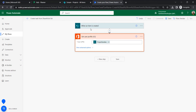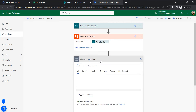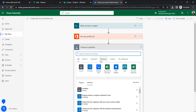For the principal name I'm going to provide the Project Handler email from the dynamic content. So when an item is created and a username is assigned in the Project Handler people column, the flow will trigger and this action will get that user profile to then create a task in Planner by assigning this user.